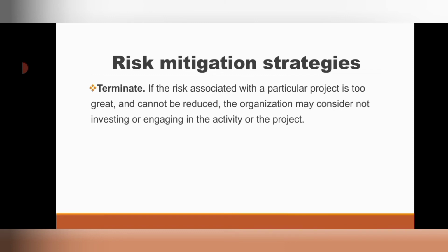So when the chance of the risk occurring is too high and the consequence of the risk is high, should this happen, the option is to terminate the project.